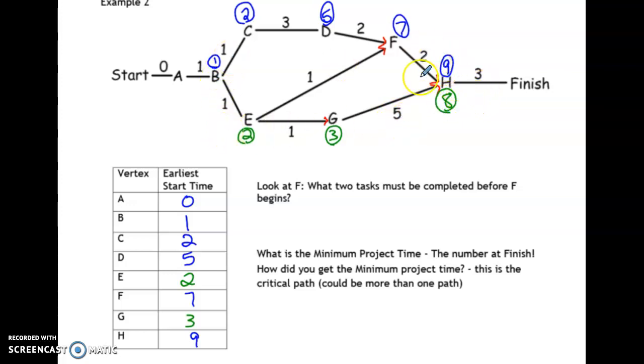Well, the first path of taking the sports pictures and things took 9 days. So you want to pick the highest number, okay? Because we can't mail these pages if only the teachers' pictures are in there and not the sports pictures. We have to have all the pictures in there, okay? All right, so we have one more path here that we didn't look at yet.